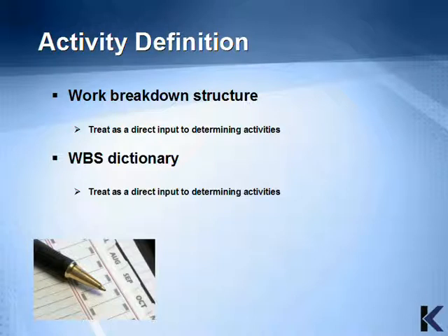To make sure time is allocated for all the work to be performed, use the work packages from the work breakdown structure and the work breakdown structure dictionary, which will help explain them, to estimate the time for each project activity.